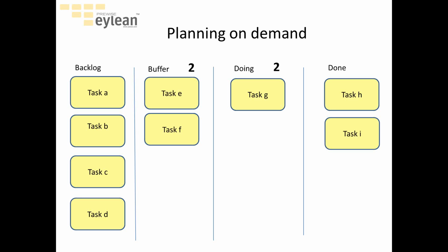So first of all, I have a limit of 2 here. It says that I, for instance, have only 2 engineers that could produce work items, and it means I want to limit their multitasking, and of course this number is a control valve, how many items I want to let down the stream. Also, this is a number which offers us prediction, and it offers us some kind of calculations for the backlog.